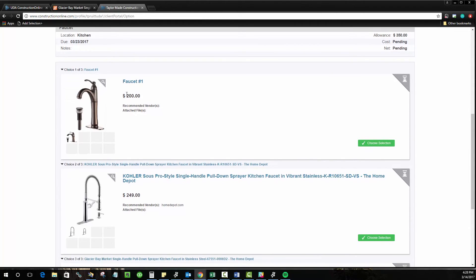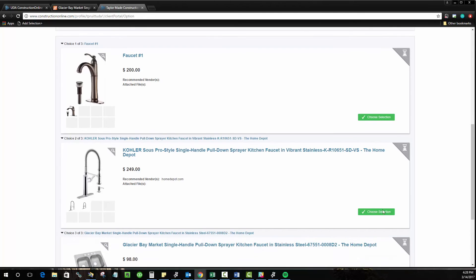And if you do have markup included, this cost will be the marked up cost and it will not be the base cost, so they won't know what your markup is. But all they have to do is find the one they want, click choose selection, and it will approve that for them.